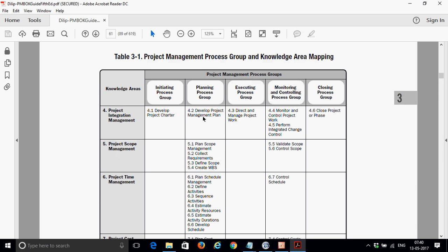And so this is called a project charter, and that's given by the project sponsor or a business sponsor. They will give it to the project manager. Once the project manager receives that, he can start the project. That is the first and starting document that every project manager has to have to start the project. So for developing a project management plan, you need a project charter.